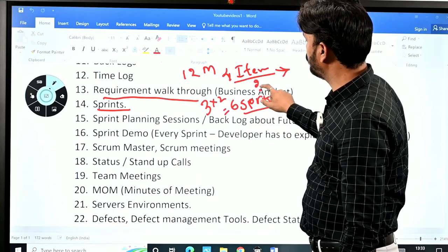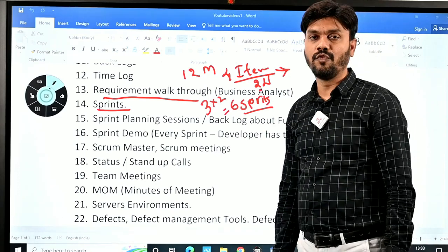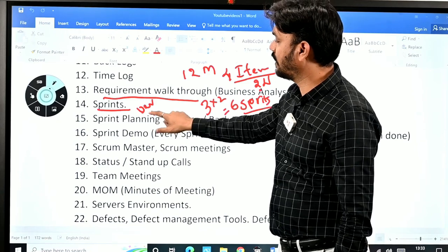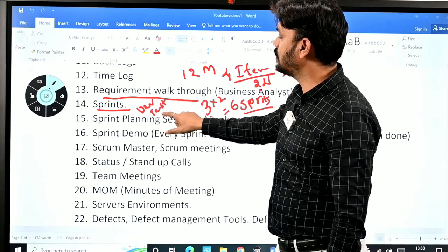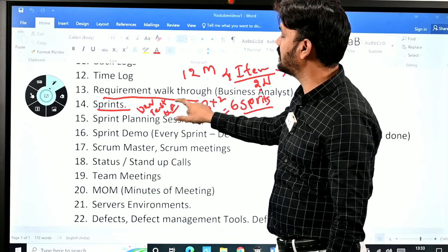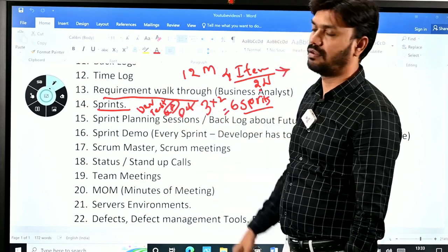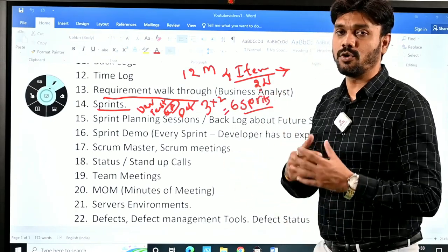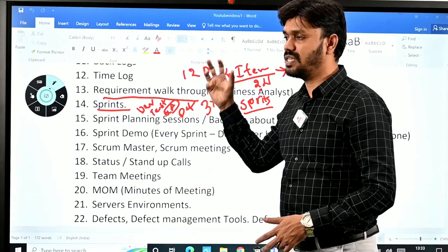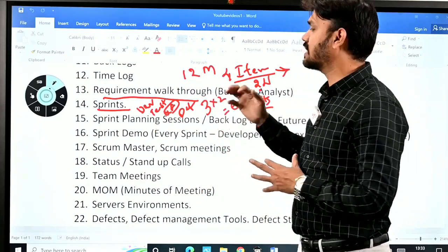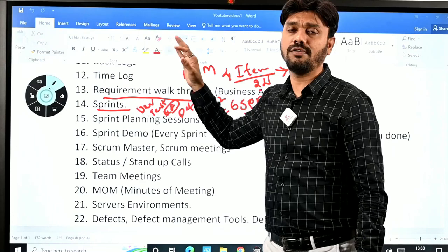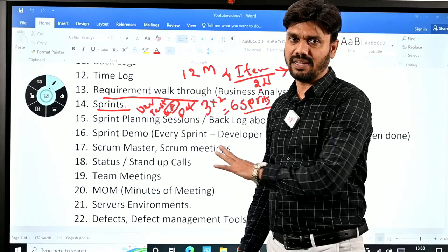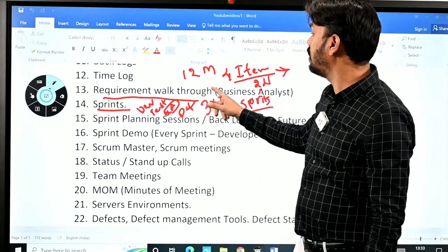Usually a sprint time is 2 weeks. That is for development, for testing, and for moving into QA, where QA testing will happen, defect fixing as well. See, your business requirements that you are going to get in the JIRA tool, the user stories that are going to be assigned to you in Scrum methodology, you have to work on finishing your business requirement, including development, defect fixing, testing, everything, and the tester window will also be there. That is for 2 weeks.